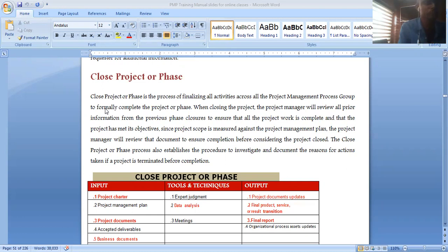The completion of the project is not that you're completing each activity, but you're closing the activities, like where you have to sign off, where you have to accept, where you have to make amends in certain areas, you do it and ensure that contractually every activity or phase is being closed.